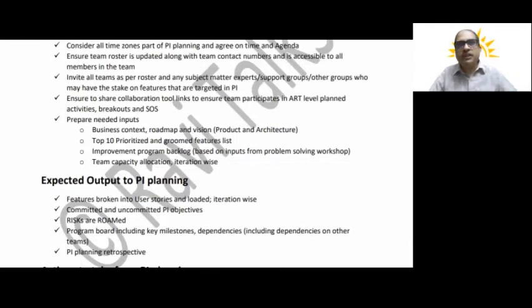But most of the time I could see many organizations, especially in this distributed and dispersed environment, starting backlog grooming for the upcoming PI hardly in the fourth or fifth iteration of the existing PI. Grooming is such an important activity because in PI planning you will be given 2 to 3 hours for breakout, wherein you have to understand the feature, convert it into user stories, and identify the dependencies.